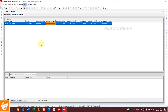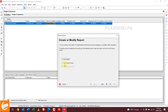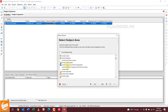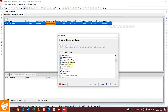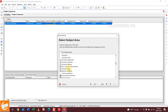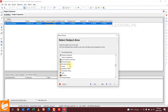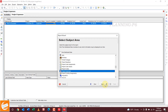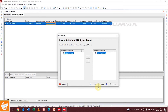Go to Tools, then Report Wizard. In the Report Wizard, if you want to use the current screen select 'Use Front Screen'. If you want to generate a new report for the entire project, select 'New Report' and click Next. You can see many options here for costs, expenses, and categories. Select 'Project Expenses' for the expenses category and click Next.